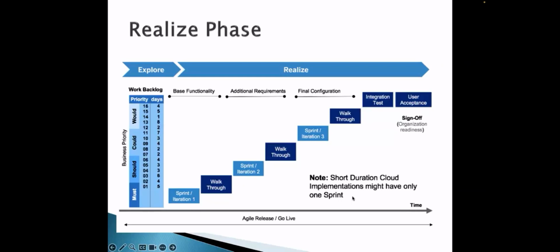Now again, after 45 days or so, you go for a second round of walkthrough of the product. By this time, the product might be 60 to 65% configured. Showcase whatever is ready at that stage. Again, there might be feedback or changes; record it, come back to office, make those corrections, and complete the remaining configurations. And again, go in front of the customer for the final round of walkthrough.